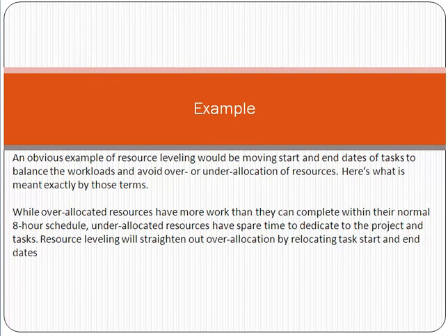For example, an obvious example of resource leveling would be moving the start and end dates of tasks to balance the workloads and avoid over or under allocation of resources. Over-allocated resources have more work than they can complete within their normal 8-hour schedule. Under-allocated resources have spare time to dedicate to the project and tasks. Resource leveling will straighten out over-allocation by relocating task start and end dates.